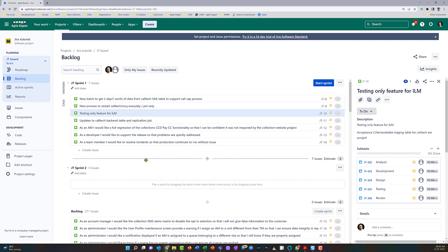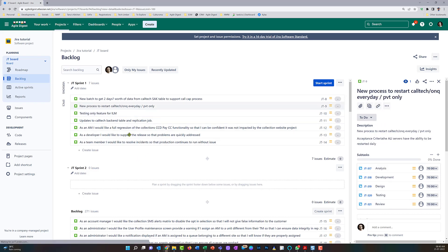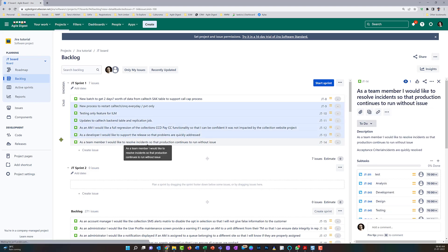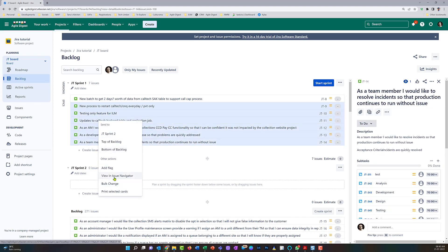For these particular stories, I want to update the estimated original hours and assign them to someone. What I need to do is — I will not be importing and creating new items, I will just update the existing ones. The subtasks are already created. To do that, the first thing I'll do is select all of these user stories and say 'View in Issue Navigator.'